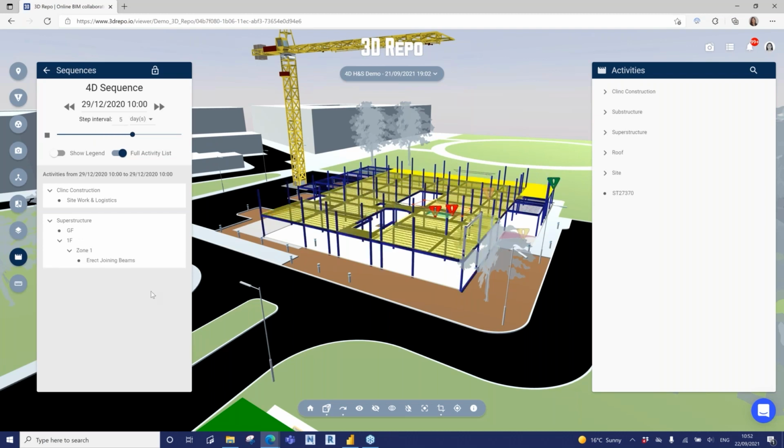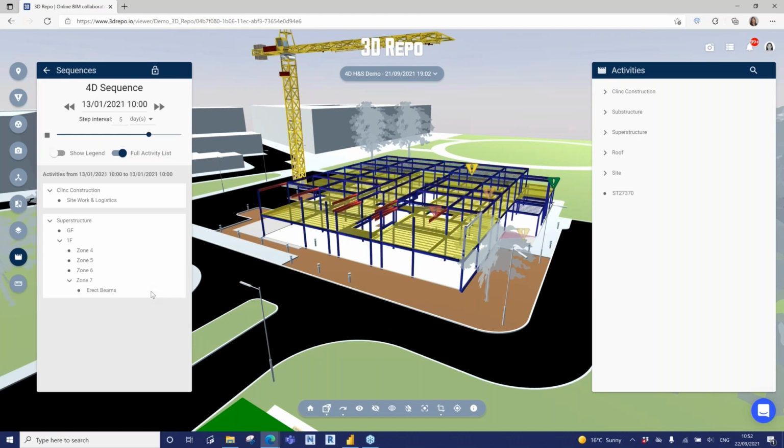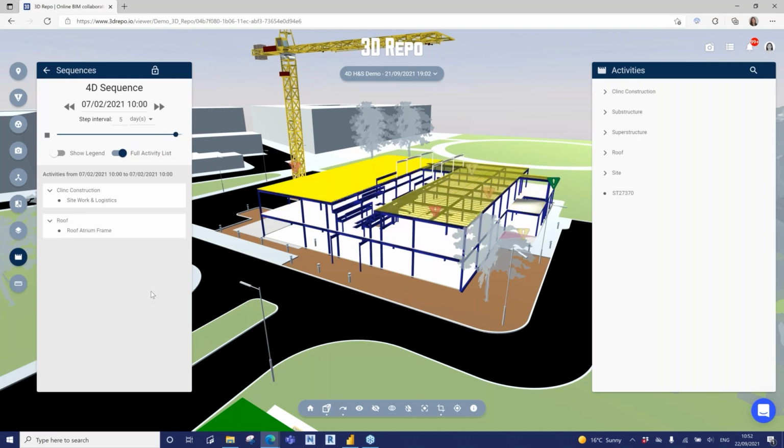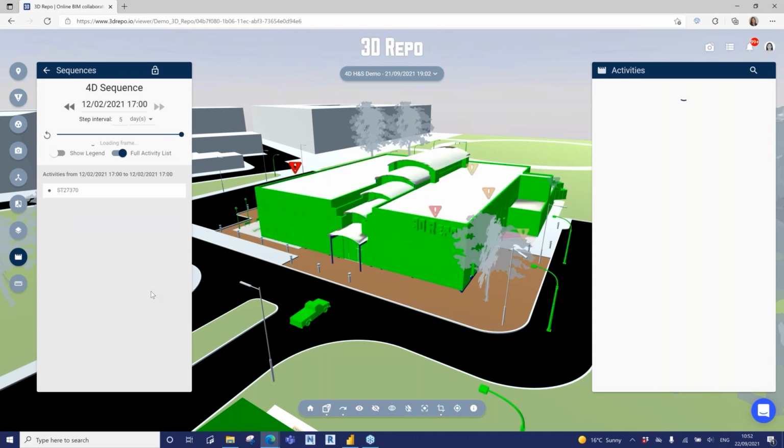And so this indicates that those risks appear and disappear over time, because we found that health and safety risk in general is actually time limited. So it gets highlighted, mitigated, then closed when you move on with your construction. It doesn't happen throughout the entire construction process, but really occurs at certain or multiple times and locations. So you can still access that risk anytime.